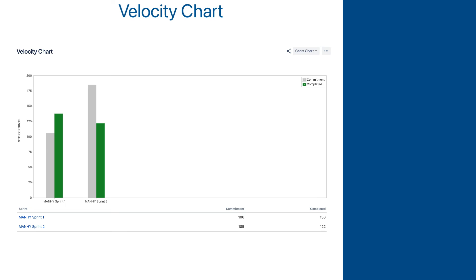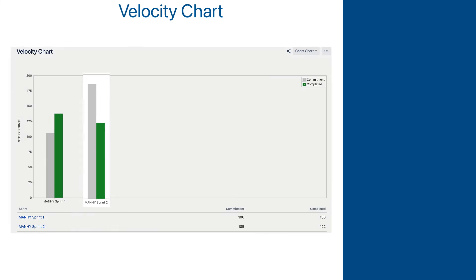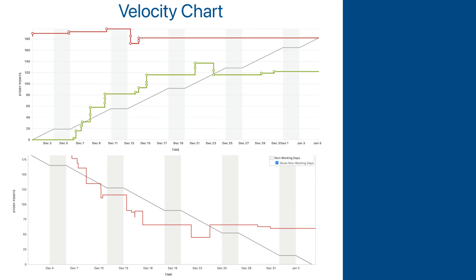For the second sprint, they planned 185 points and completed 122. In this sprint, the opposite thing happened. The team planned way more than they could do, and some work was not completed by the time the sprint ended. When we looked into the same real-life project in previous lessons, we saw this reflected in burndown and burnup charts.